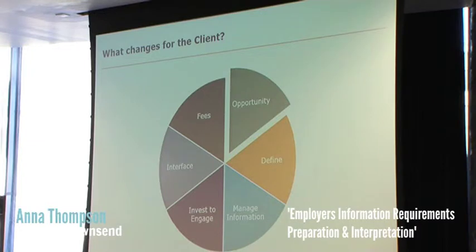So we need to think about how data is going to be exchanged, how models are going to be exchanged and shared, who's using the models. We need to consider how it interfaces with existing and developing asset data. And the client needs to consider consultants' fee profiles may change. We're not seeing fees going up, but we're seeing fee profiles changing because the BIM methodology is encouraging us to do more work up front.